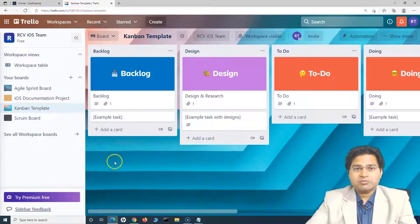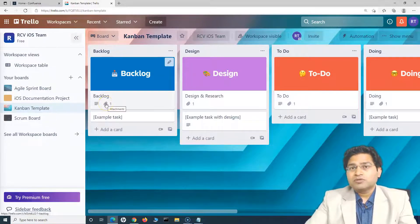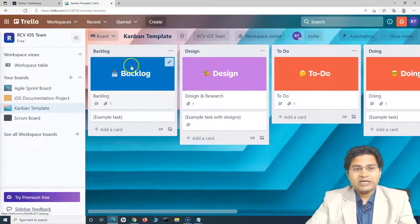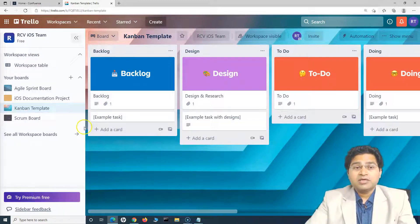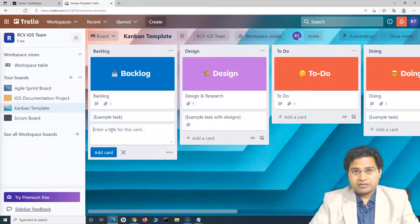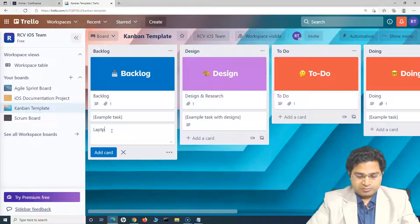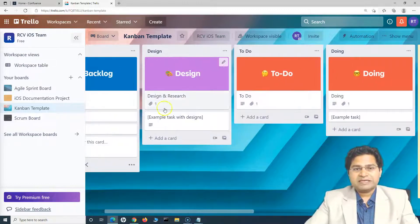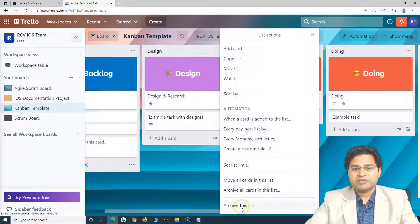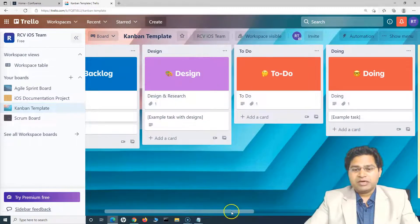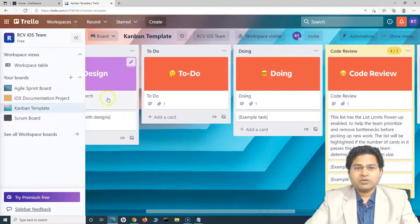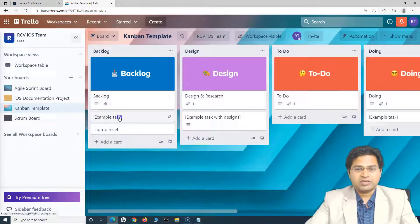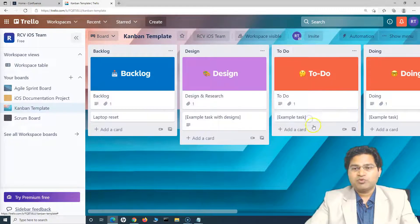In Kanban you can have sprints too, but it is more suitable for teams with a continuous flow of work. They'll have a backlog where all work items come in — for example, an IT support team receives tasks like 'laptop reset' raised by members within the organization. If design and research is not required, you can archive that column. You also have 'To Do', 'Doing', and 'Code Review' columns.